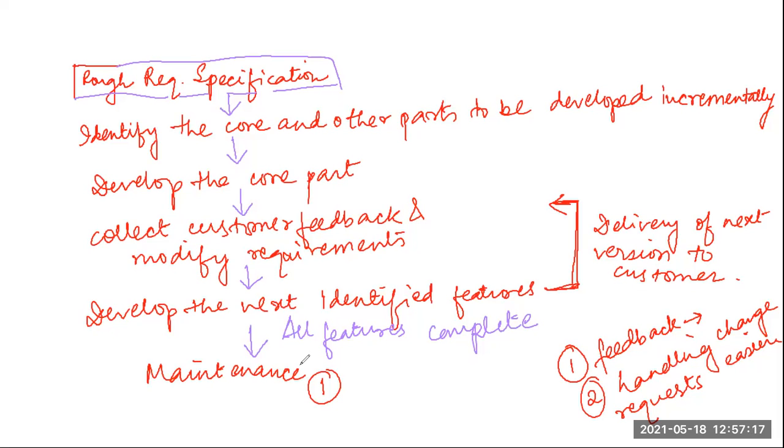So even if an expert comes to divide it into incremental parts, and is successful in doing that, a considerable effort is needed to plan and to deliver the incremental deliveries. So incremental delivery is not good for large projects. So this is one disadvantage.